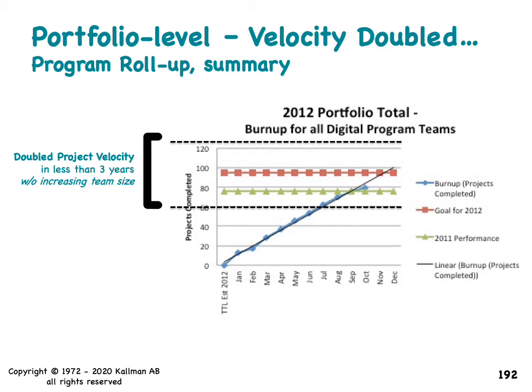And what's interesting is when we started with all of this, at the end of 2010, they had over 260 projects in their project backlog list, which means that at 58 a year, they had almost 4.5 years worth of work that they needed to deliver. 4.5 years. Now, if you add up the 72, 98, and 124, I think you come up to 290 something for the 3 years.